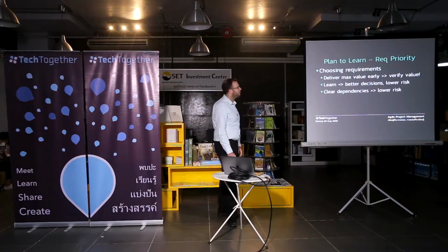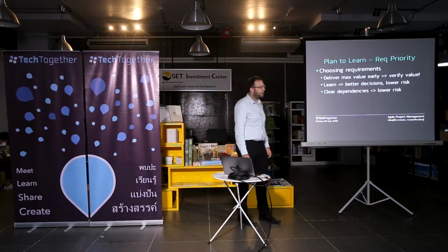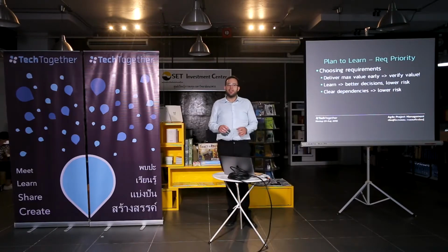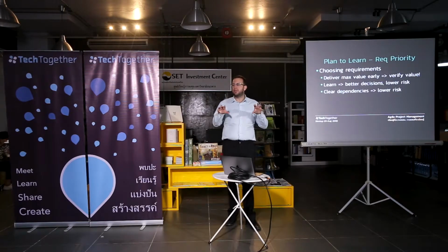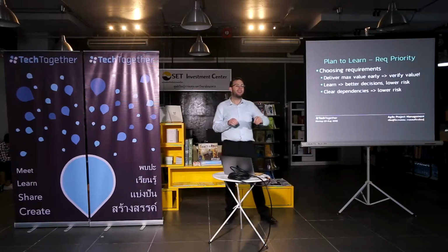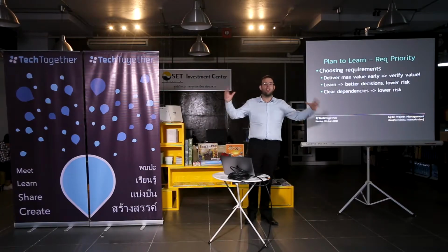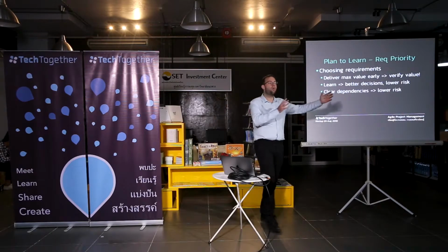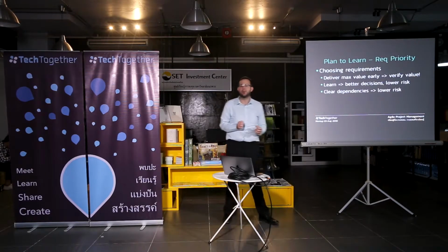The last one I want to bring up is dependencies. So if you have a piece of work that is blocking another piece of work, then given the choice, if everything else is equal, finish the blocking work as soon as possible. Because you don't want to discover later, actually, it's a very big piece of work, and now we cannot continue on the other piece of work.